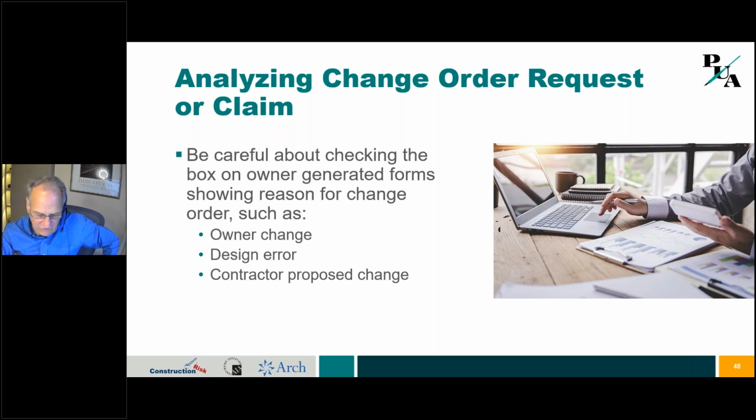But what happened in that case was the owner says, "Hey, I've got this indemnity clause, and it says that the designer has to indemnify me for all claims and damages, etc. And this is a claim, and so I want you to indemnify me." And the court said, yeah. Not only did AECOM have to indemnify the owner, they even had to defend the owner against that claim. And this was just a run-of-the-mill contractor claim. Unbelievable. That was because the indemnity wording wasn't limited to third-party claims. The court said, well, it didn't say only third-party claims. It applies to first-party claims for damages, and the duty to defend, and it doesn't say anything about professional liability, it's just every kind of claim. So be careful of that. Okay, next slide.